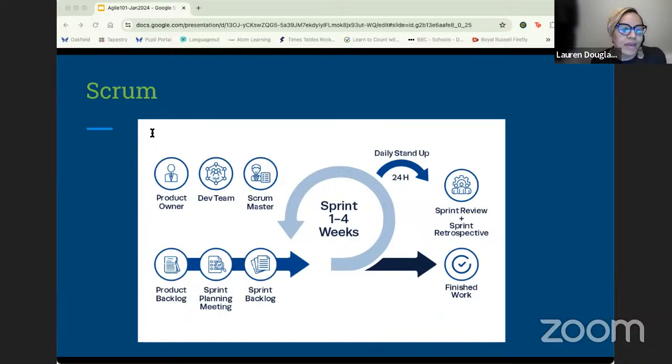no blockers. At the end of the sprint, the team hold a sprint review meeting. And in this session, you would invite in stakeholders, possibly customers, external customers, depends on the session and the team. And then that's where you present what you've completed within the last sprint and you ask for feedback. And this feedback should influence what you do going forward. So, it could be decided that actually we're going to take a different direction, or we're going to pursue an area that we maybe hadn't thought of.